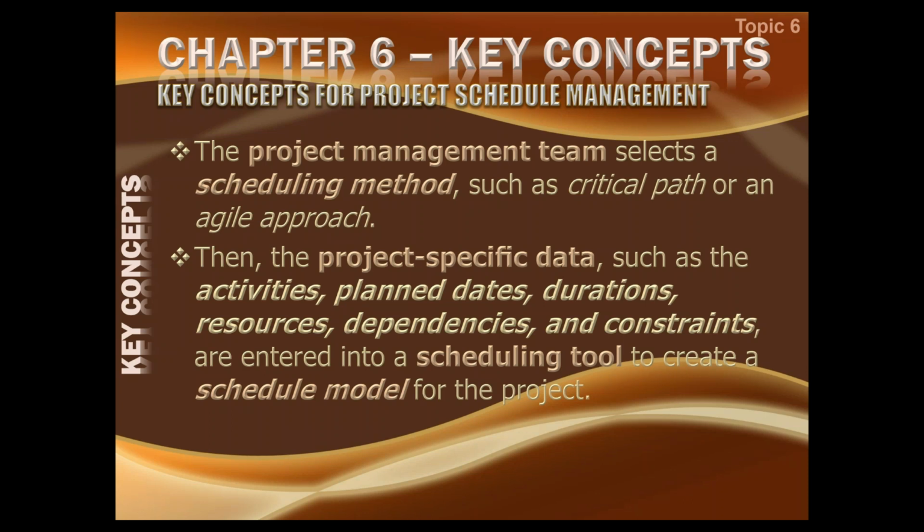Therefore, the first baseline, even that took a lot of time, we wanted to be sure, and we played with many scenarios, and ultimately, with a lot of care and spending a lot of time in preparing the schedule, we have finally decided the final shape of a schedule, which we have gotten approved from our bosses, and ultimately, we have baselined it. Baselining means the ball is now not in my court, and if there is any change required, the change request has to be moved and approved by the authority which has baselined it.